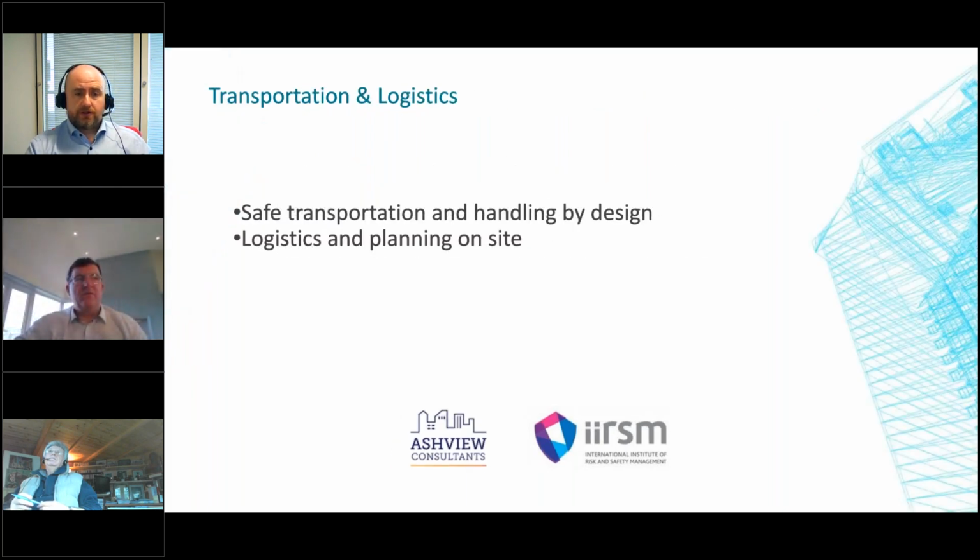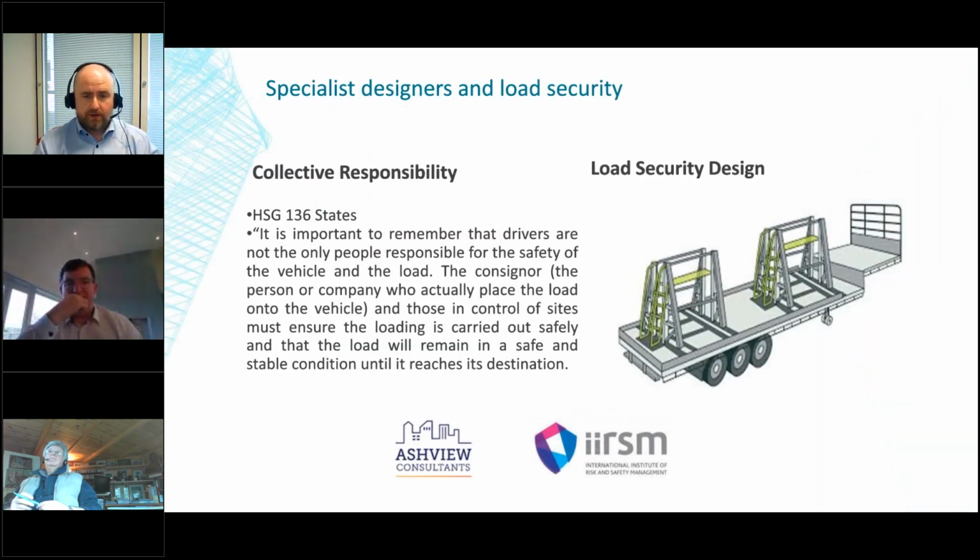Okay, so just following on from now, we're going to talk about safe transportation and handling and logistics and site planning. As Paul said, you're moving large pieces of precast about, and there's a perception with some parts of industry that that's the driver's responsibility only for the safe transportation of loads, and this is the HSE's guidance. It's important to remember that drivers are not the only people responsible for the safety of the vehicle and the load. The consigner and those in control of sites must ensure the loading is carried out safely and the load will remain in a safe and stable condition until it reaches site.